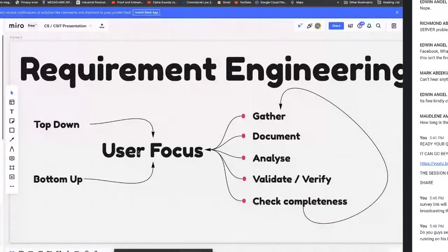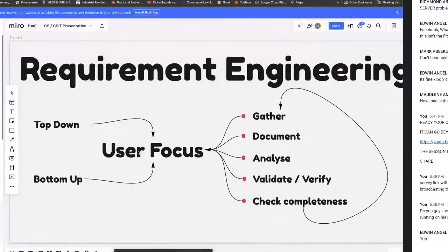After documenting, you want to analyze these requirements. Sometimes some things relate, and you need to see how this relation actually happens. In that case, you want to take your time and determine, okay, after a user logs in, maybe in our case there's a requirement that after some time he's supposed to be logged out. So what service will be monitoring that time for the user when he logs in? This analysis is what you will do, because some requirements have sub-children, in the sense that the requirement leads to other requirements which may not be stated by the client, but you want to let the client know that this thing we are doing, this is the implication. So it means we have to do this also.